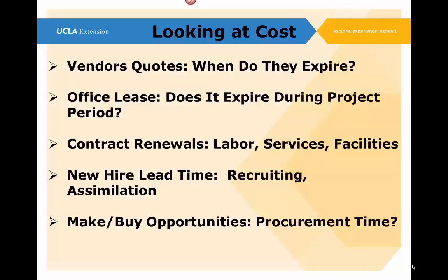And if we're going to get people transferring into the project, either later on to do tasks or to become part of the permanent project team for the duration of the project, what is the assimilation, or I call that spooling up time? In other words, if a person is going to report Monday morning at 8 o'clock to the project team to go to work there, our schedules and the way we look at it, well, we expect them to be doing productive work at 8 o'clock in the morning when they sit there.